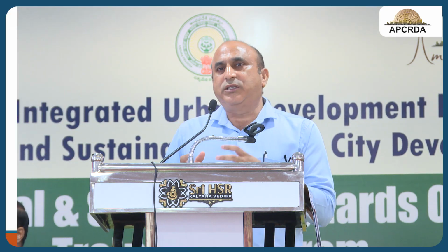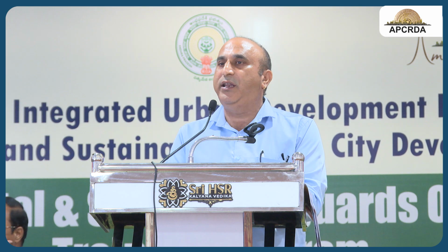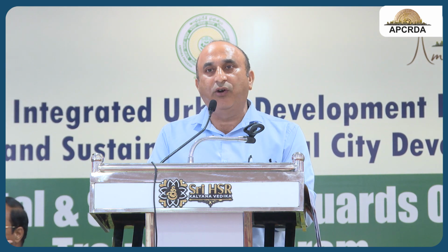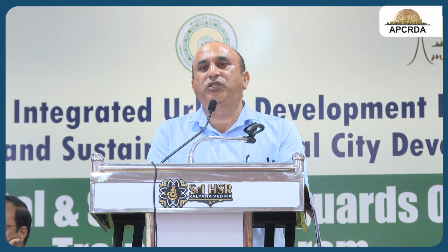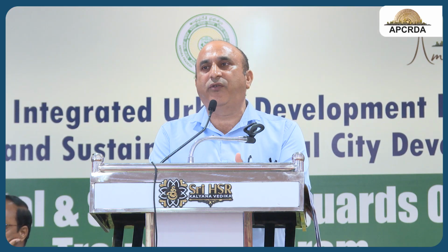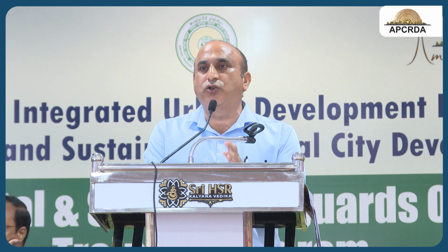Then we need to see that a traffic management plan is also in place, which is site specific, because our material would be carried across areas which may have sensitive locations like hospitals, schools, colleges, and some areas which require special attention like biodiversity areas and forest areas. For those we need to take special remedial measures, and that should be documented in your project specific traffic management plan.